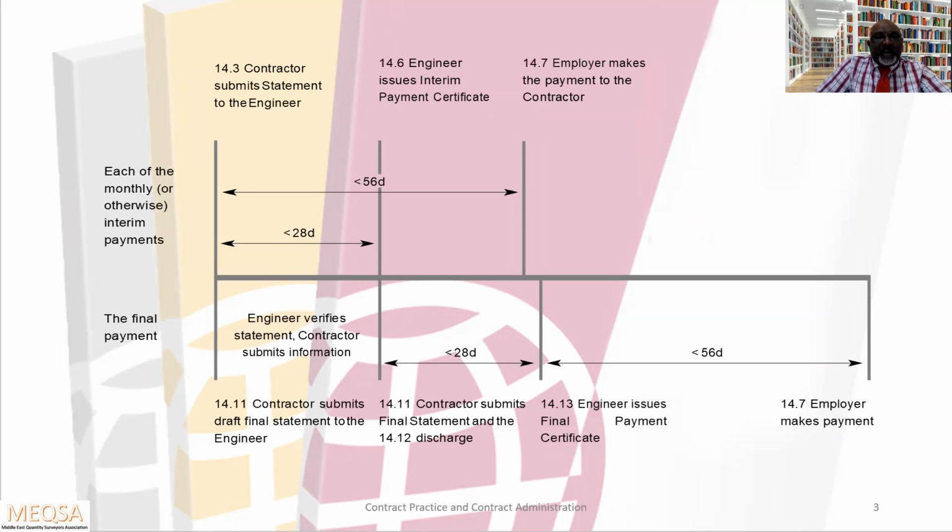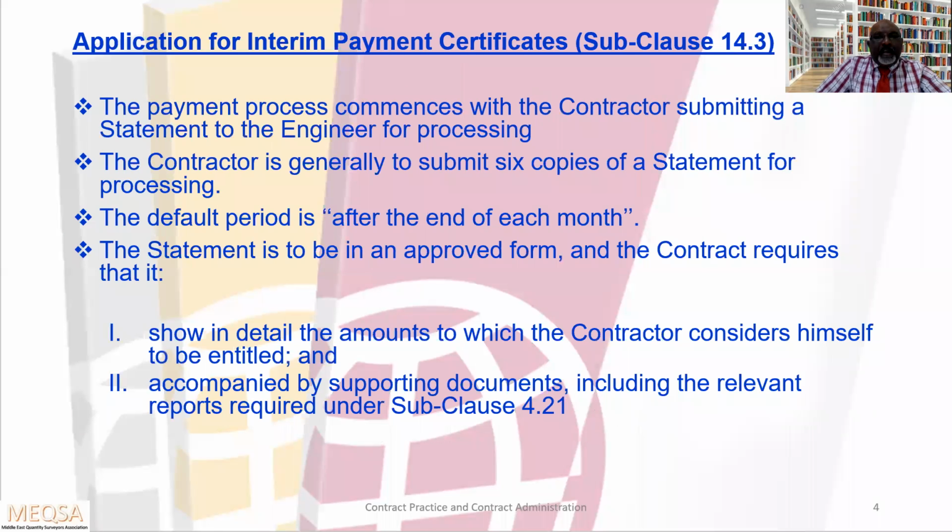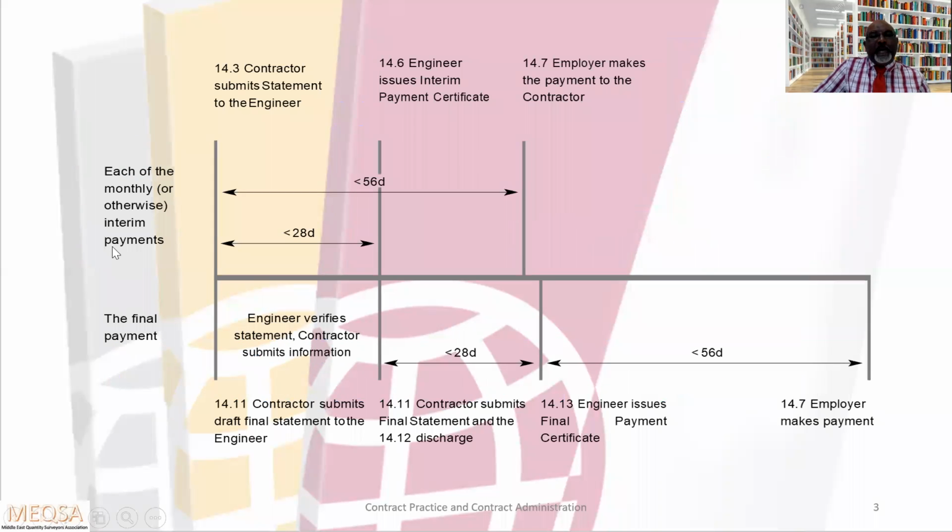Let us see the next one. Here, the same thing is mentioned. The payment process commences with the contractor submitting the statement to the engineer for processing, because the payment commencement date will start from the submission of the contractor's statement. So from here onwards, the time will start.